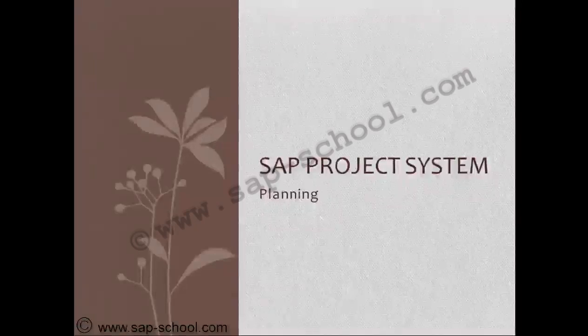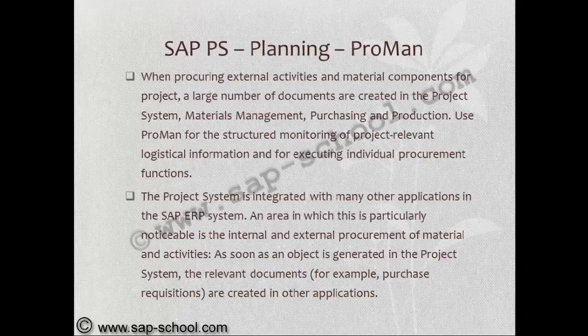We see another monitoring tool is Proman. When procuring external activities and material components for a project, a large number of documents are created in the project system, material management, purchasing and production. Use Proman for the structured monitoring of project-relevant logistic information and for executing individual procurement functions.